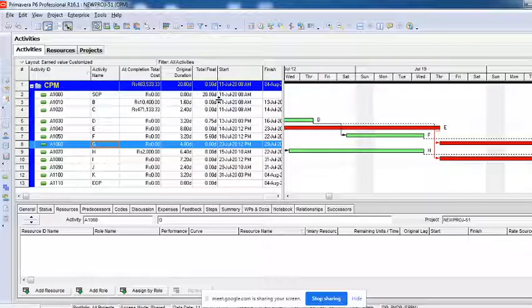Now we'll have to give justifications: what happened, what the assumptions actually were, and then what actually happened. We will have to convince the client that it is neither a problem of planning nor a problem of the contractor, but something not under any of our control. That is the reason why it has happened. Then the client might give an okay. But if the client feels at any stage that the problem is not because of an external effect, but was a mistake of the PMC or of the contractor, the client will not approve the change in the plan or the change in the project.